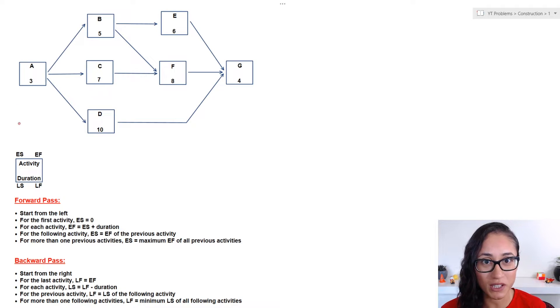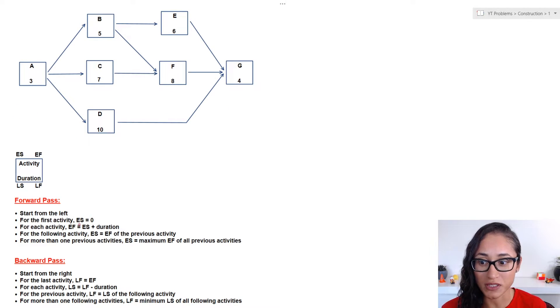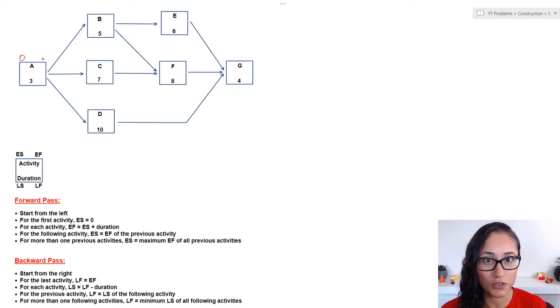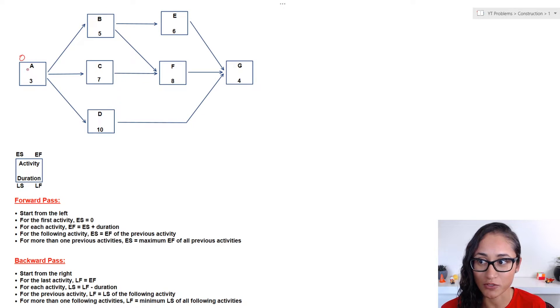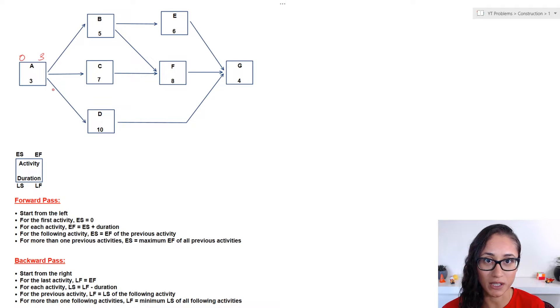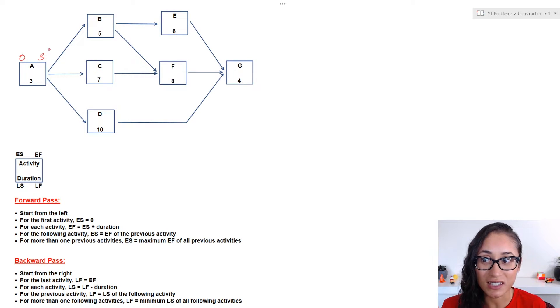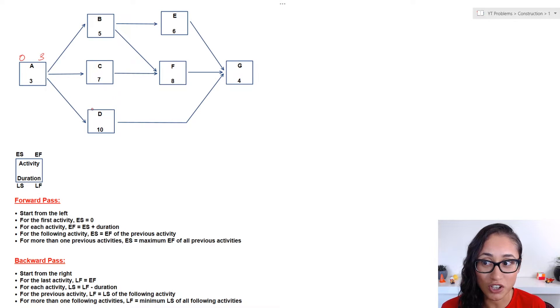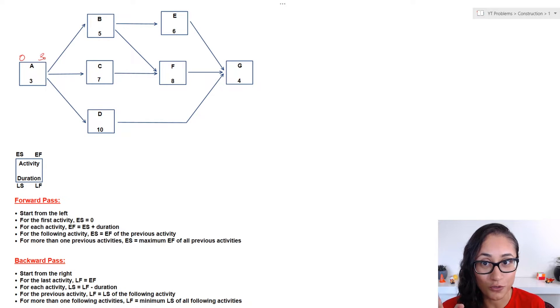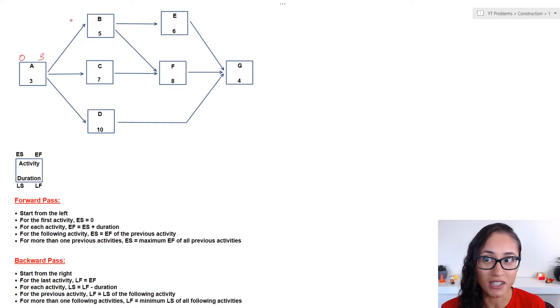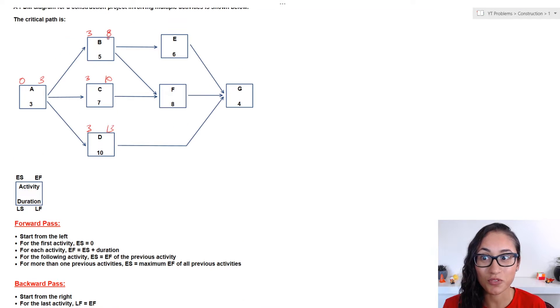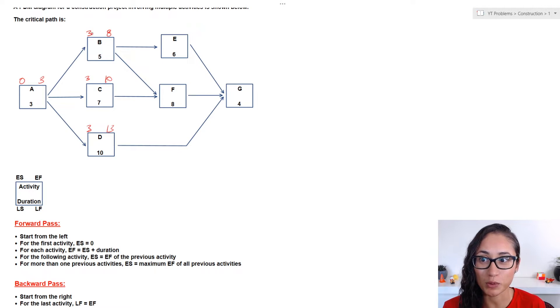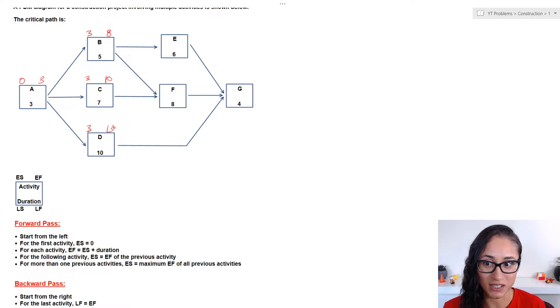Forward pass tells us to start from the left and work ourselves towards the right. Also, it tells us that early start for the first activity is zero. So, here I'm going to put zero. Now, to find the early finish, all I got to do is add duration to the early start. So, I'm going to have zero plus three, which gives me three. Now, these arrows, what they mean is that activity B, C, and D can only start till activity A finishes. So, all these activities are going to start after day three. And so, early start of B, it's going to be equal to the early finish of activity A, same thing with C and D. Now, to find the early finish for these activities, all I got to do is add duration to the early start. So, here we have three plus five is eight, seven plus two is ten, ten plus three is thirteen.